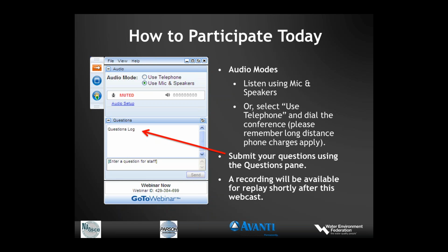Okay. Another question, moving along, try to get as many of these as we can. Is there a typical warranty for CIPP? Yeah, for the entire project, the typical contractor's warranty is 1 year. And that's typically what most CIPP specifications have. Sometimes I've seen 3 years. Once you get to 5 years, it starts getting very difficult for companies, especially public companies, to bond those. But the typical contractor's warranty is 1 year.